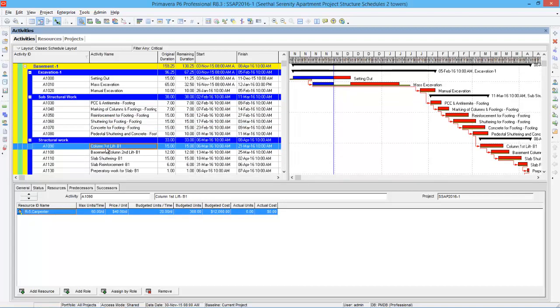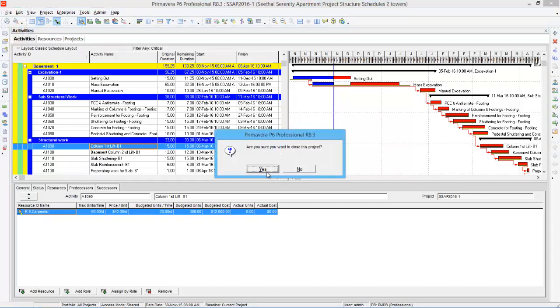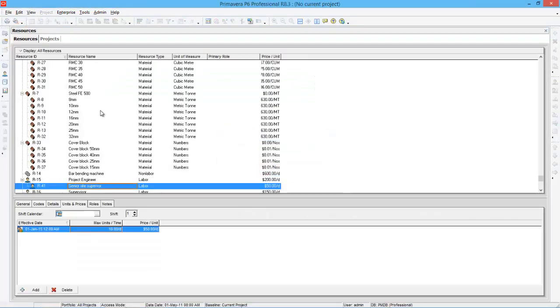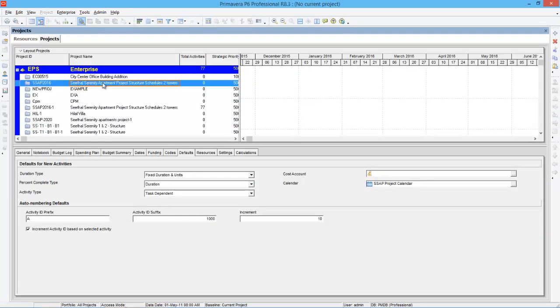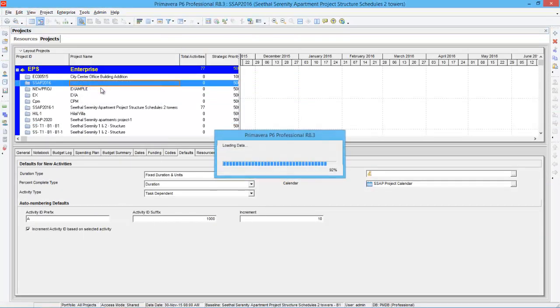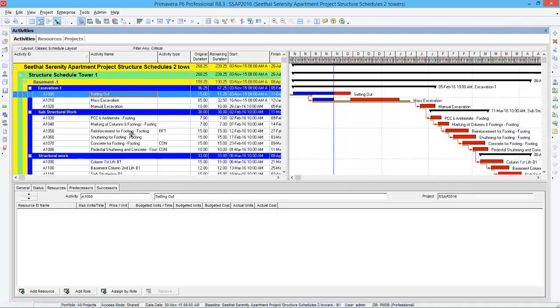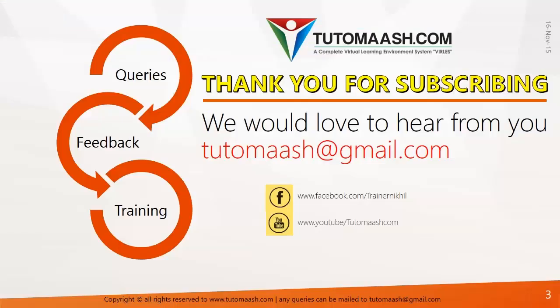So this is just an example. If you want to make any major changes you can go for global change. There are a number of options that you can make changes in Primavera. So this is working in this project. So what I do, I'll close all, I'll go to projects, I'll open the real project. So this is the real project. I'll open it and I'll do the same thing here. Because once you've done the global change you cannot go back. So I'm reminding this again and again. Once the global change is done you cannot go back. So you have to be very careful when you do global change. So hope you understood the session. Thanks for watching.